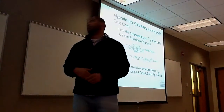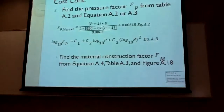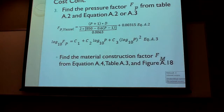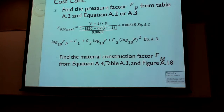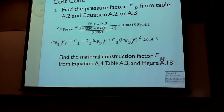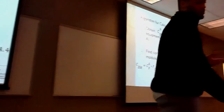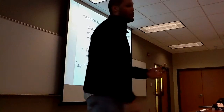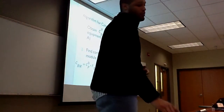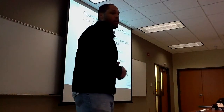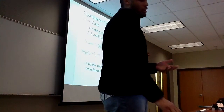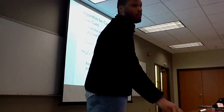The third step would be to find the pressure factor using equations 8.2 and 8.3, and also table 8.2 in the back of the book. Your P would be your actual pressure, and your D would be your vessel diameter for equations 8.2 and 8.3. After finding your F sub P, you would want to find your construction material factor, F sub M. This would also use equation 8.4, shown in table 8.3 and figure 8.18.